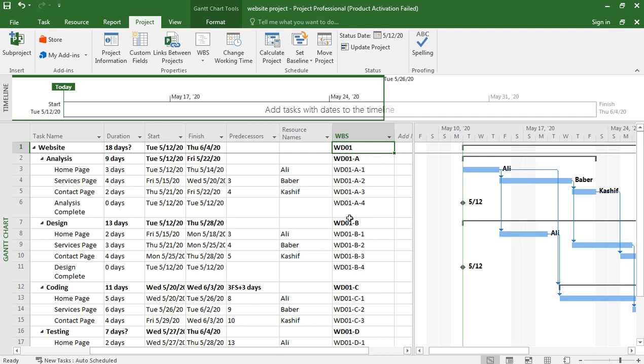So the work breakdown structure, we know we can use it in reports and in documentation. This is why we use this structure: we divide and break down the work. This format is easy to read: this is the web design project, this is 01, and we can add the department. Which department is involved, whether it is graphics designing, testing, design, analysis, or coding. So we can use the departments, capital letters, small letters, and numbers. This is WBS, right?